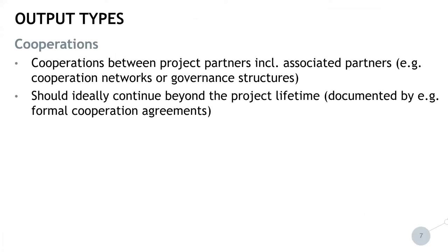Let us start with cooperations. Cooperations between project partners including associated partners are considered within this output type. They can, in the frame of a project, be further formalized, for example in cooperation networks, or the project could lead to the setting up of respective governance structures. Ideally, these cooperations established in the frame of the project should continue beyond the project lifetime, and in order to reflect this in the indicator system, they need to be documented in formal cooperation agreements.